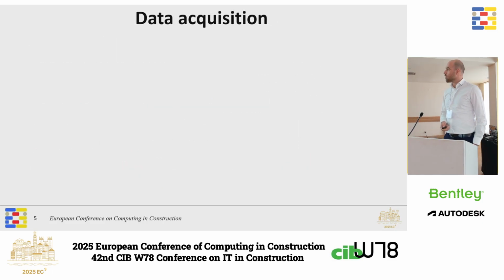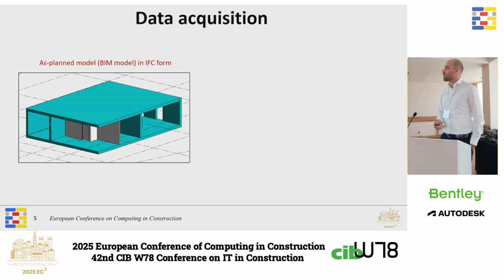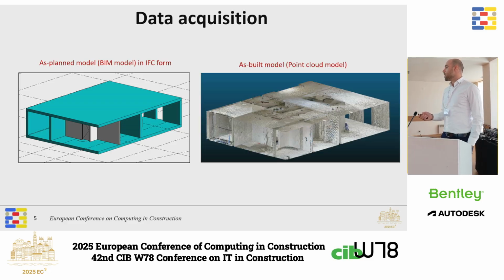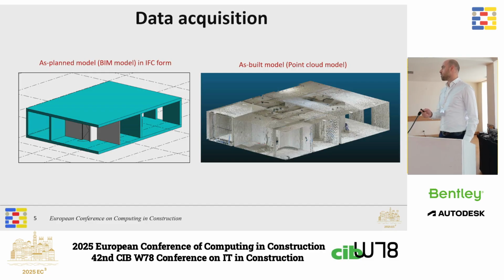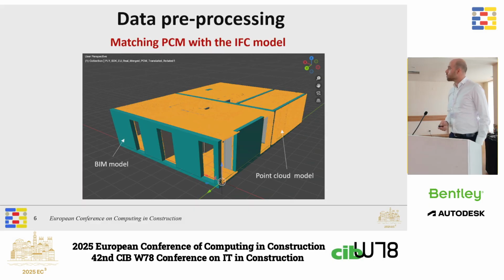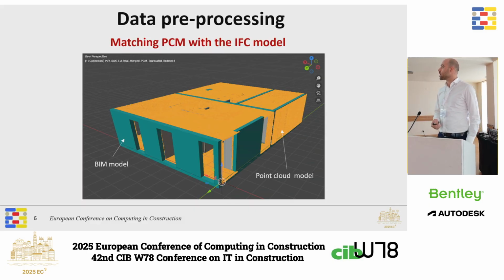We start with data acquisition. We acquired our as-planned model, actually the BIM model in IFC form, of a building that is under construction. Then we capture the as-built model of the same building environment during a certain time in construction in a point cloud model. Then we proceed to data pre-processing.